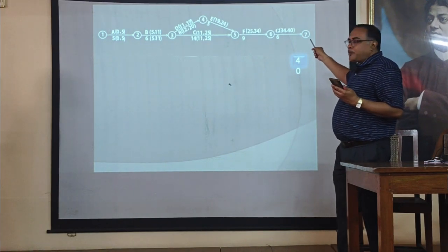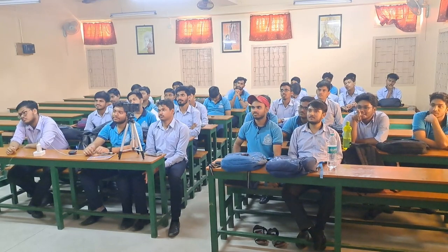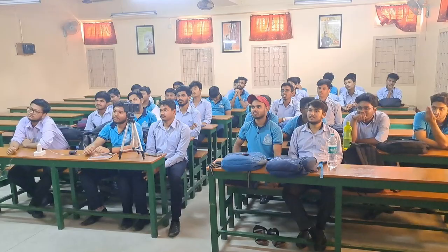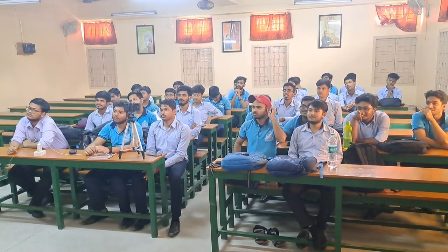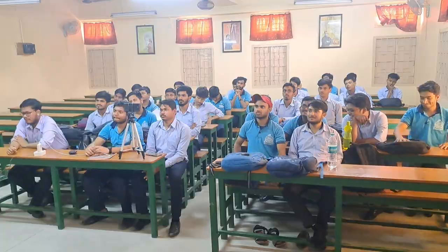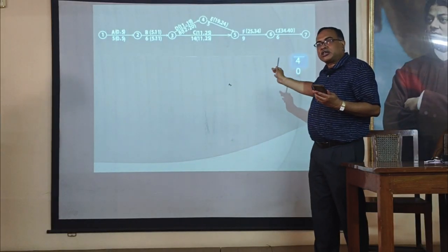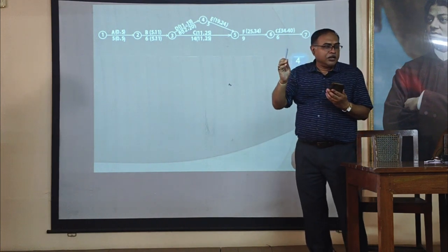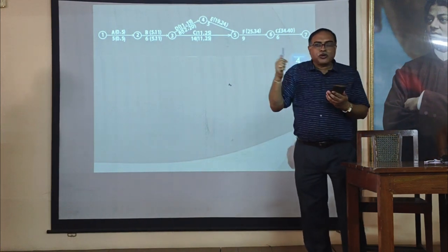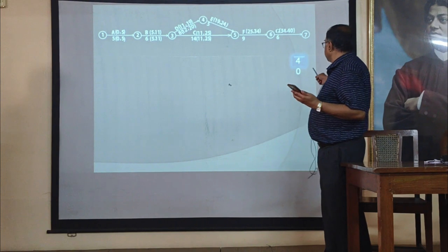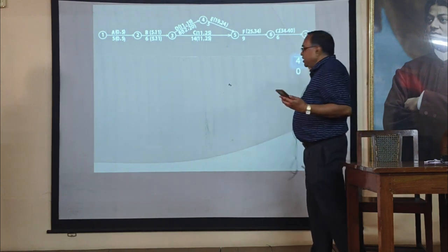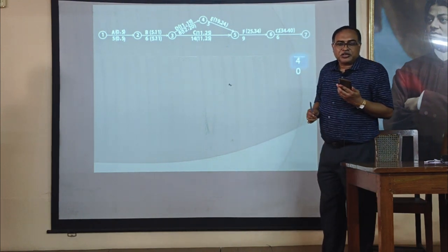Next, G activity. What is the value of early start time? And early finish time? 40. This is our forward technique. We have started from our starting activity and reached our finishing activity and early finish time. What is the project completion time then? It is 40 days.